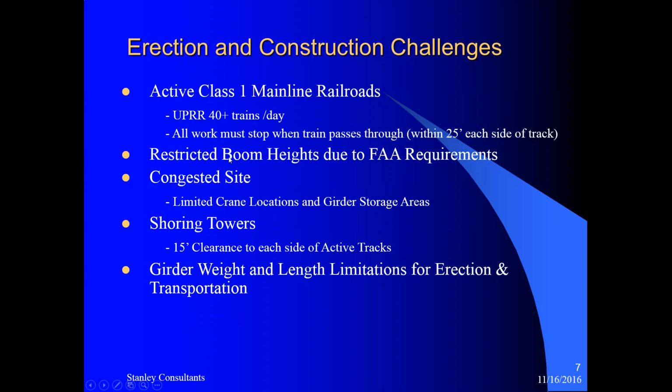In addition to that, the boom heights of the cranes are limited due to the air space requirements, which keeps the booms at about half the normal height. The site is also very congested. There is not enough space for crane locations, and girder storage areas are very limited.